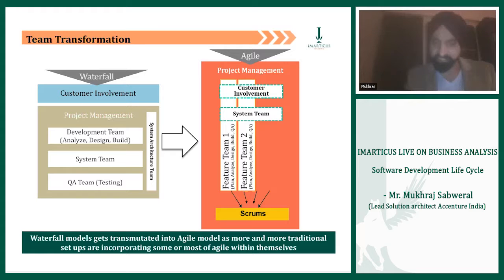Feature 1 was automating one component. Feature 2 was automating the second component. And that's how I built 5 teams of 10 people each. Gave them separate sets of requirements. Many requirements can be developed in parallel. So guys, I just reshaped 50 people into 5 teams of 10 each. I gave them the kind of work in which requirements are not to be built sequentially, hence they can work independent of each other. Each team has the same mix of skills. So each team has business analysts, designers, testers, coders, etc.